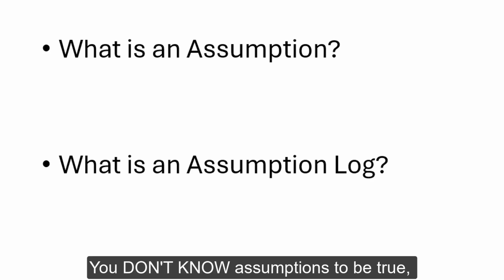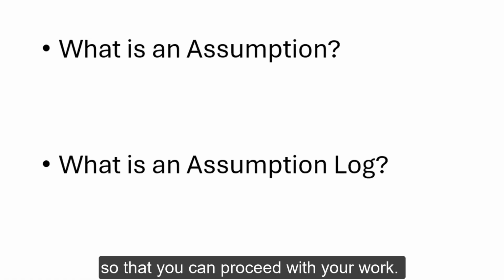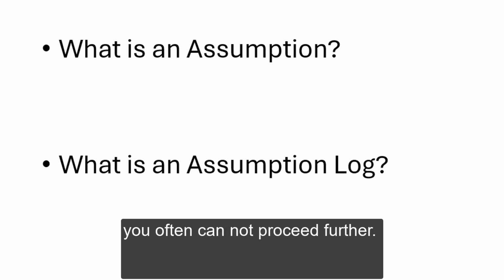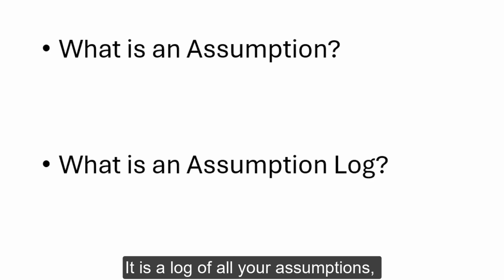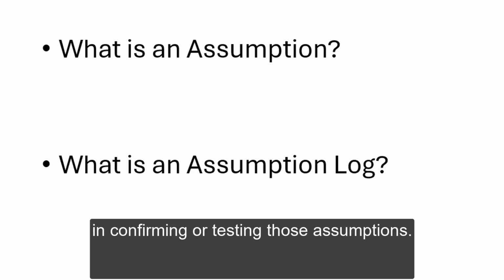You don't know assumptions to be true, but you assume the factor to be true so that you can proceed with your work. This happens every time, everywhere. Without making some educated guesses, you often cannot proceed further while starting a project. And the next question is, what is an assumption log? It is a log of all your assumptions and, more importantly, your progress in confirming or testing those assumptions, whether it is really true or false.